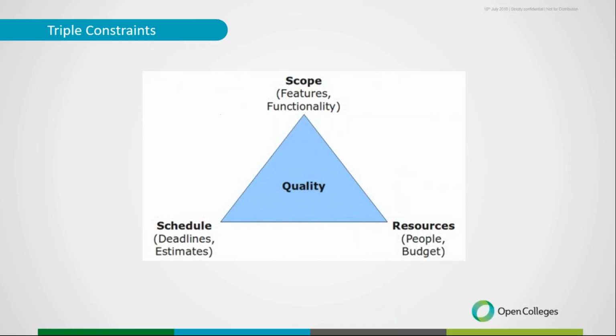So often the scope is the most important part, but from my background, when I did a lot of events, the schedule was by far the most important part, and everything was dependent on the schedule. If you were running late and got behind on the schedule, you don't have the option to delay a concert by a week just because you're running late. So you have to stick to that, and that's your fixed component of the project. So you either cut back on what you're doing, reduce your scope, or you throw more people and more money at it to get it done on time.